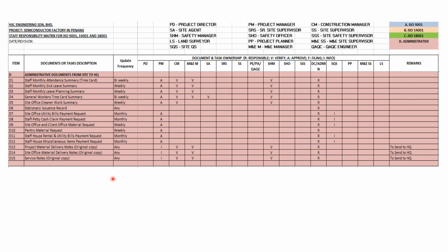The project manager must not wait too long to review this responsibility matrix, and must not wait too long to make sure that the documentation is done when the project is done. So as advice, the project manager can do a weekly staff meeting to go through this responsibility matrix.